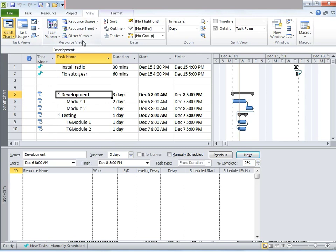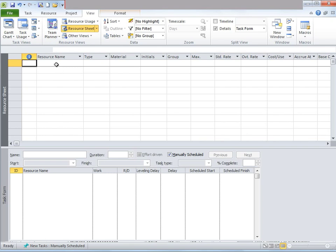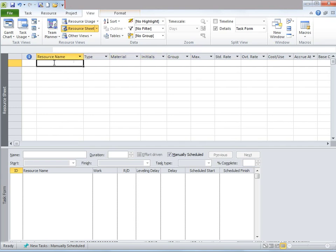I have two options. I can go to the View tab, and under Resource Views, there's something called Resource Sheet. I'm going to click on that. Once I do that, the Resource Sheet opens and I can go ahead and start typing in the resource name, type, material, initials, and so on, and include all the resources. Or I have another option: to include resources from another file, provided that resources already exist in another file and we share the same resource pool.